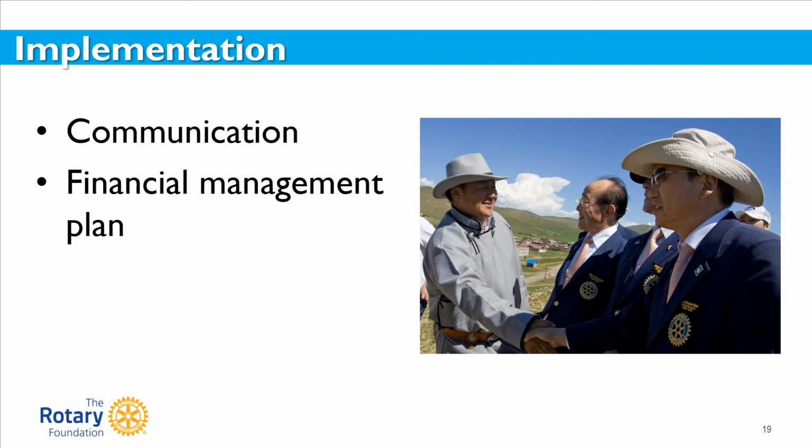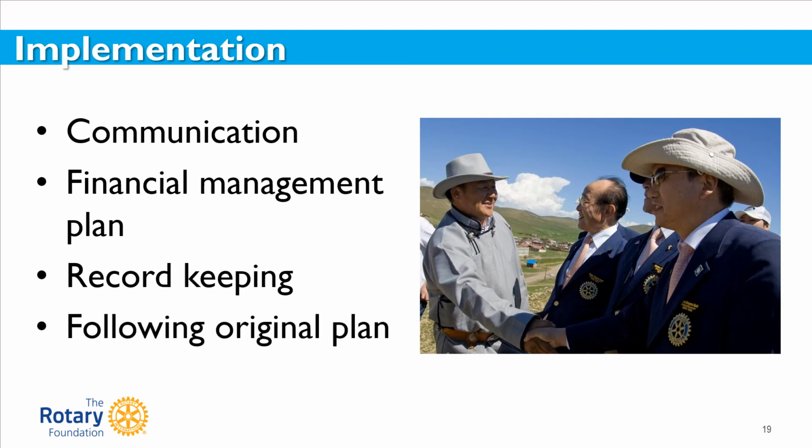The club must implement a financial management plan for grant funds, including a separate bank account, a plan to transfer the custody of the account if necessary, a method for the distribution of funds, and ways to satisfy any requirements related to local laws. Detailed grant records help with reporting on the use of grant funds, responding to inquiries, and increasing the transparency of how grant funds are managed.